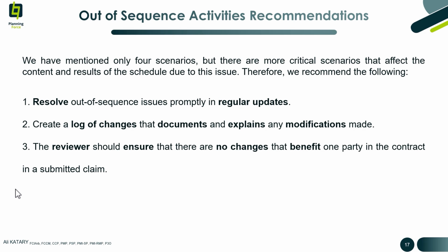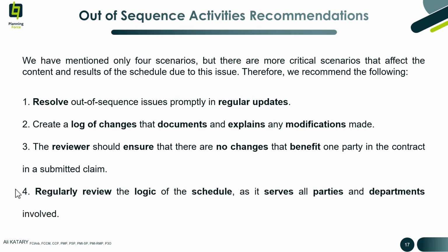Number 3, the reviewer should ensure that there are no changes that benefit one party in the contract in a submitted claim. Number 4, regularly review the logic of the schedule as it serves all parties and departments involved. The conclusion: it is essential to resolve out of sequence activities before starting work on delay analysis.